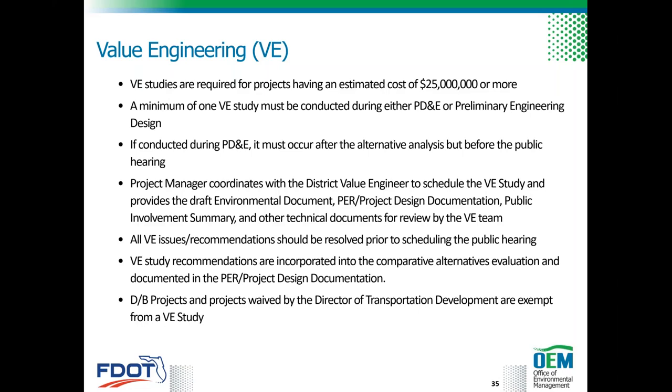The project manager then is in charge of coordinating, scheduling the value engineering study with the district value engineer, and making sure that the draft environmental document, the PER, and summary of public involvement and other technical documents are available for review by the value engineering team. Any recommendations from the value engineering study must be incorporated in the comparative analysis evaluation and documented in the PER and environmental document.